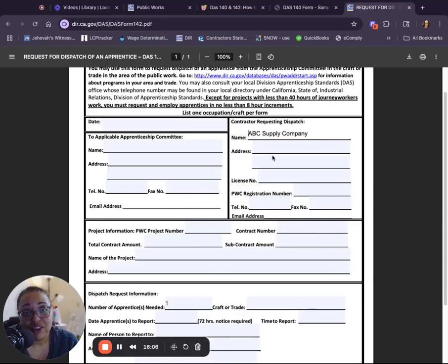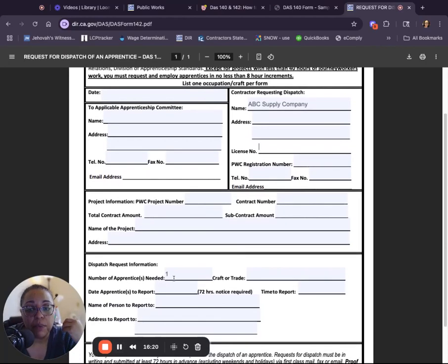So when you request dispatch, put on the hat. You now are working there. What is the address of that company? What is the license of that subcontractor? Those are the details you need to put in. How many apprentices do you need? One. No one is going to be mad at you if they're like, Susie Smith, we needed 2 apprentices. Okay. But if you put down 200, because in your head you're thinking, oh, I need 20% of the hours, that union is going to call so fast because they're going to think, oh my goodness, every single one of our apprentices is going to have a job for life if they need 200.